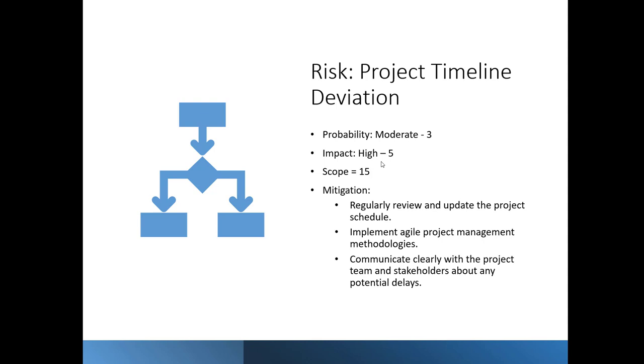Something that's important with these sorts of steps is it's good to have multiple people score these sorts of things, so that it's not just you thinking, oh, this is definitely something that's really high. Someone else might be like, no, this is really not a big thing. This is a really clear project. Don't worry about it. They might score it less. And then you can take the average of the score and then figure out how likely this is going to be a risk for the project.